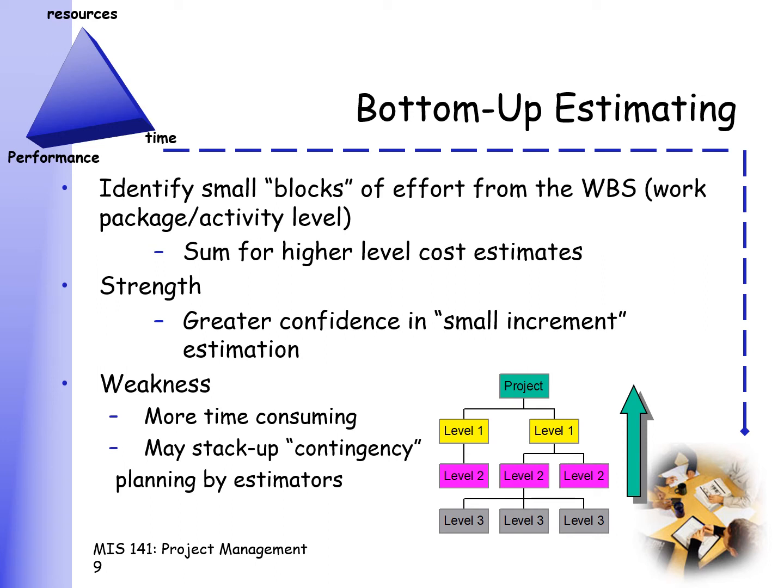Okay, so it's no wonder that sometimes top management does not believe the project manager when a project manager gives them an estimate. Okay, so two different types of estimation: top down from phase down to the activity. Bottom up is from each and every activity up to the phases. Each and every one of them has their own pros and cons.